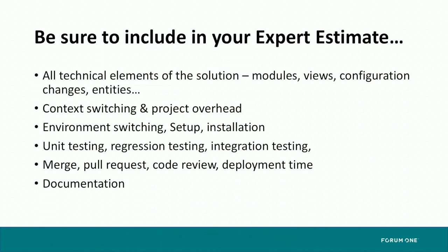So be sure to include in your expert estimate all technical elements of the solution. Are you building modules? Are you deploying contributed modules? Are you building views? Are you making configuration changes? Some things, like a configuration change, will happen automatically when you build a new view and save it, so you're getting configuration added into your repo.